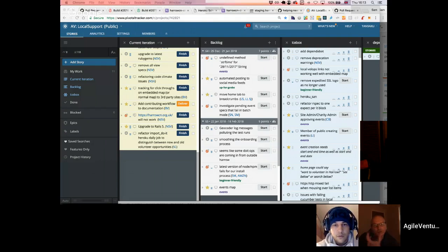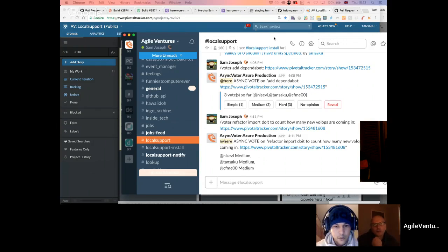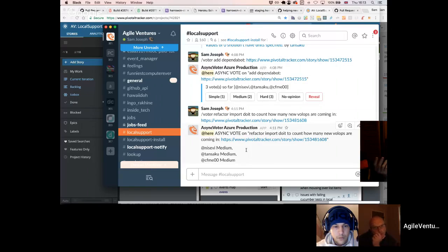Yeah. I'm sorry, I have a question. So when you reveal, it reveals for everyone? Yes, it does. Okay. Yeah, and so the idea is planning poker, and the idea is, as you may know, that if we all were just talking about the thing and how difficult we thought it was, if one person says, "Oh, I think it's going to be really hard," then that may influence people, and you may not pull out differences in opinion. So the whole point of it is to provide a mechanism that allows people's assumptions to be exposed independently, and not just have a group think where everybody agrees something is simple or hard, and it promotes discussion and debate. So. Yeah. And we've got a third on that one, so we could do a reveal there.